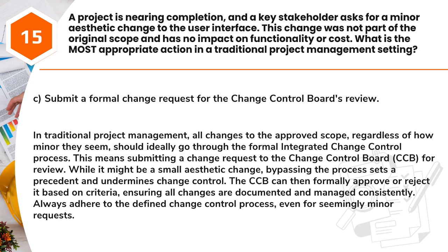While it might be a small aesthetic change, bypassing the process sets a precedent and undermines change control. The CCB can then formally approve or reject it based on criteria, ensuring all changes are documented and managed consistently. Always adhere to the defined change control process, even for seemingly minor requests.